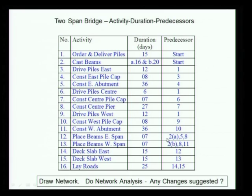The more level of detail I go, the better I may be able to represent the project. In this case it will depend — this activity is 20 days, and it is very likely to take more than 20 days; only a calculation can say that. So, what is the early start of 'place beam east span'? If the early start is anywhere close to 17 or 18, then this split makes a difference. If it is not, this split does not make a difference.